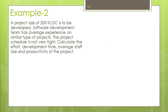Next example: a project size of 200 KLOC is to be developed. The software development team has average experience on similar types of projects, and the project schedule is not very tight. Calculate the effort, development time, average staff size, and productivity of the project. To solve this, we first choose the most appropriate mode. The mention of average experience and a not-very-tight schedule indicates that semi-detached mode is the most appropriate mode for this problem.